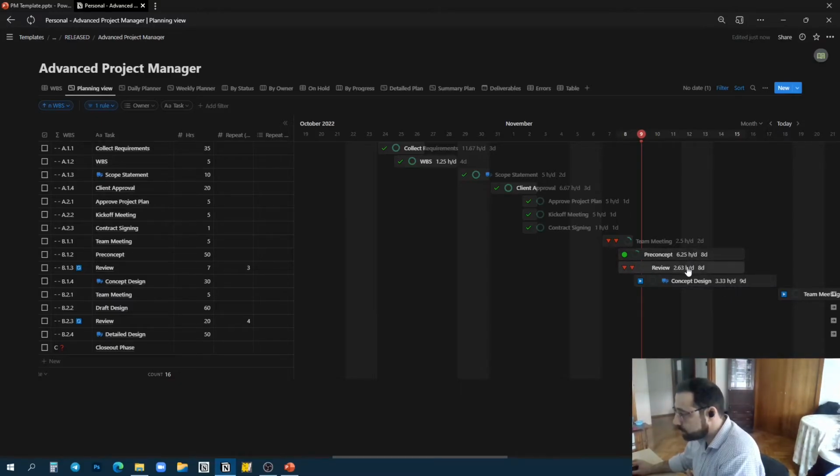Now, if you're working 6 hours, 2 hours, and 3 hours, this is way more than 8 hours per day. So this is a little bit bad planning, assuming that you want to work 8 hours per day, the regular working hours per day. So if you have 6, 2, that's 8, and 3, you're talking about 11, 12 hours. That's unrealistic, and you shouldn't work like that, and you shouldn't plan. This is bad planning over here. So either you need to add more people to work with you in order to distribute this, or you have to move this around, give yourself a little bit more days for work in order to drop your daily working hours. So you see how this is possible to help you in your planning.